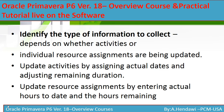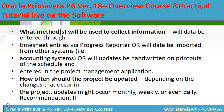You have to identify the type of information to collect, depending on whether activities are individual or resource assignments, or any other information. What method will be used to collect the information? Are you going to use time sheets tied to P6? Do you have accounting systems where you assign each resource? How often will you do the project update — weekly, bi-weekly, monthly? Some oil and gas companies do their update every hour, especially in turnaround projects which are very critical. Any delay there causes a big loss of money.